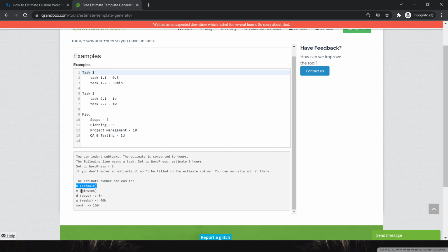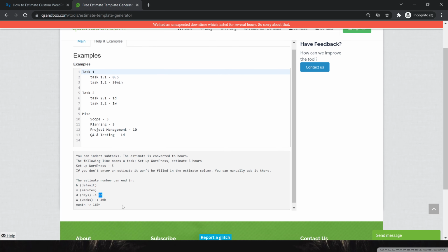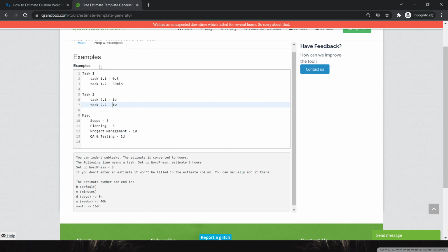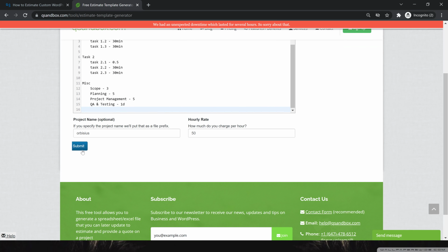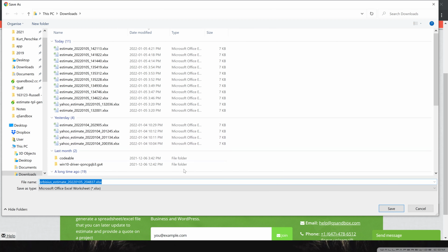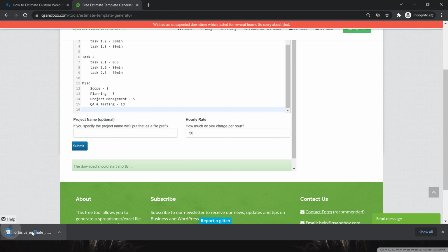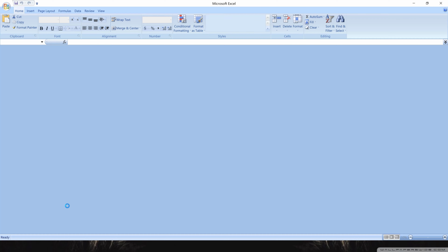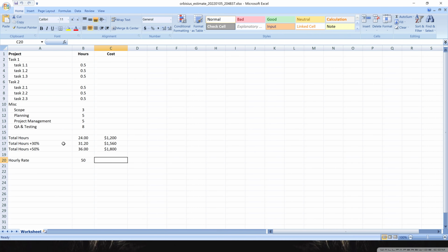By default it's in hours, but if you add M, it's going to be in minutes. If you add D, days, each day is going to be treated as 8 hours, like a business day, and for a week 40 hours, and a month is going to be 160 hours. And when you're done, you can click on submit. And depending on whatever you've entered, that's what's going to be shown.